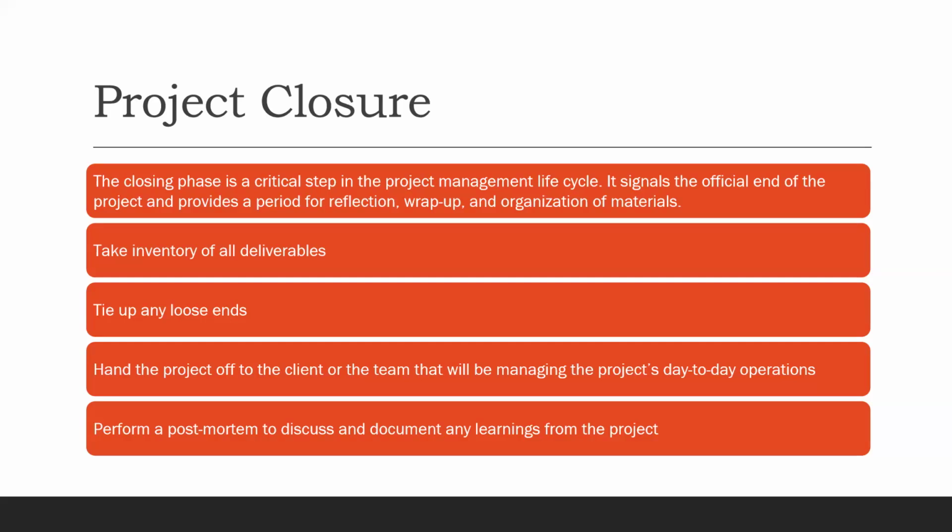Now, your project closure plan should be integrated in the planning process, in the planning phase. What we do is we come up with an exit strategy. Your exit strategy is developed in the same phase where you are planning your project before you start executing. But your exit strategy will be an evolving strategy based upon issues that come up as the project goes.